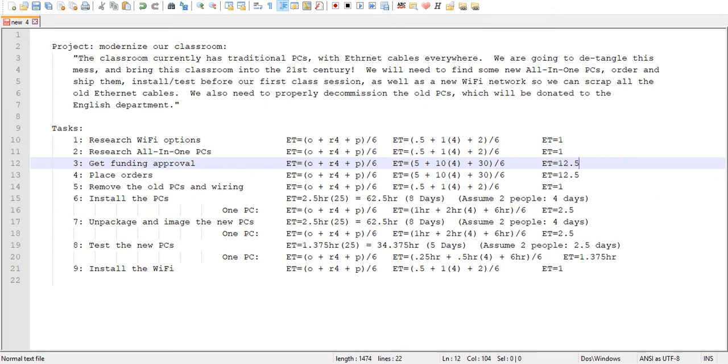And then to place the order, again, I'm encompassing the entire process. So maybe 5-day shipping is what I'm going to pay for. But realistically, if I pay for 5 days, it's going to take 10 days, because it might take a couple days before they actually put it on the truck. And then it's going to take a couple more days of slack time. Maybe there's a weekend in there somewhere.